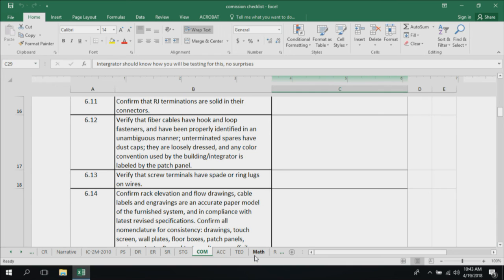What I really like on there is the call out on test equipment. What are they doing for test equipment? And do they have calibrated test equipment? Because if you're going to be getting granular on your requirements, remember we want that conformance to the requirements, we want to make sure that they're able to test to that and they're able to give you a list of their calibrated test equipment.